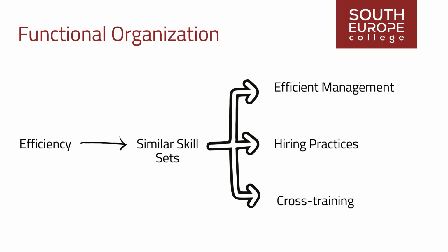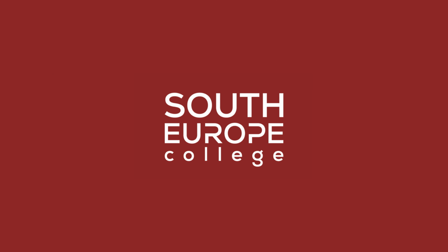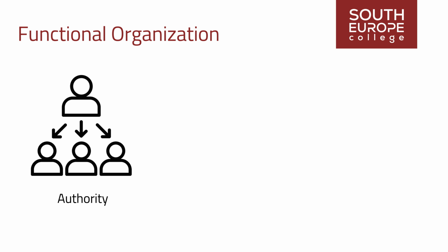Because of the need to draw resources from multiple functional areas, the structure has the potential to present various difficulties during the project. The first difficulty is authority. Though the project leader is responsible for the project's success, they rarely have direct, formal authority over all team members. If difficulties arise, the best action is to seek support from a resource's functional manager. However, this can be slow, inefficient, and especially problematic if managers agree with their subordinates. This bureaucracy can be highly damaging to projects with tight schedules or vital outcomes.